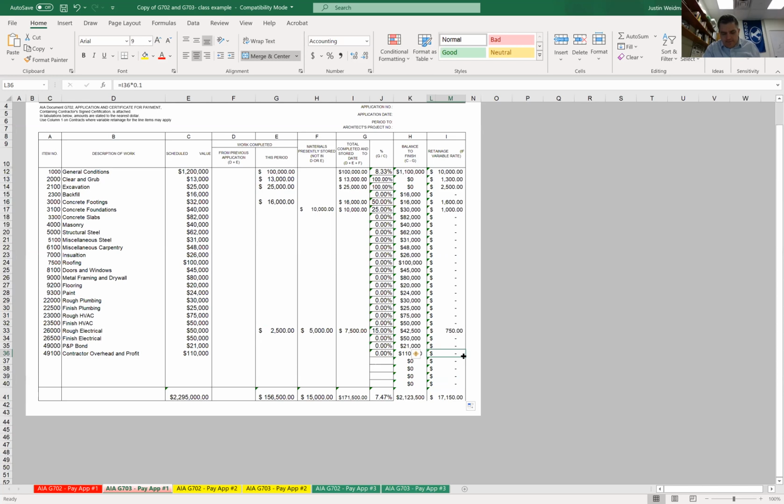as we do that. And so as you're preparing your pay application, you want to be conservative in your amount, but you also want to bill for what you can. If you're too aggressive and you overbill the owner, then that can delay your payment because they're questioning and trying to figure out whether that's okay. They're going to have more questions, but if you submit a reasonable pay application, it's more likely to get accepted.